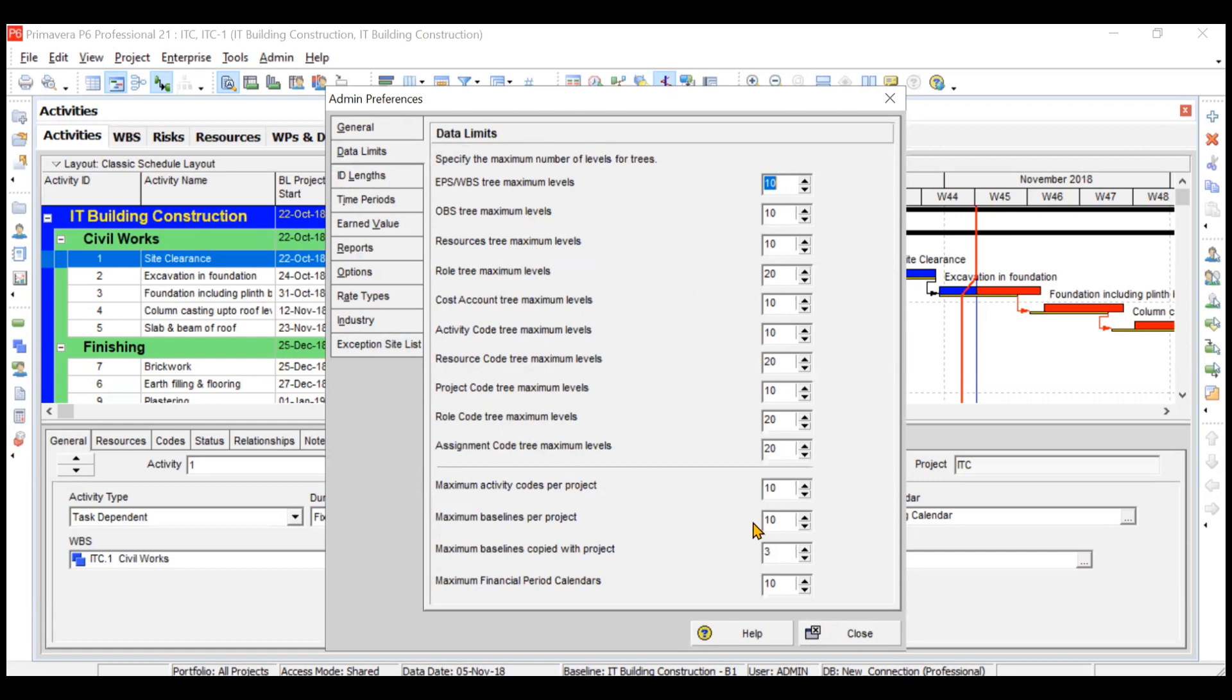You can increase the number of baselines also for your project from 10 to 12 to 14. Similarly, the number of financial calendars that you can make, you can increase that also.